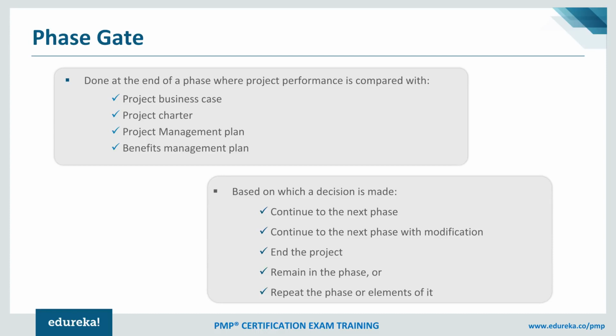When you proceed working on the project, we look back and check, as a part of the project performance, whether we completed the requirement phase or not. And when we completed the requirement phase, whether my requirement specification document has been created, and whether it has been approved by the stakeholder or not. And based on the overall progress, we then make certain decisions, like for example, whether to continue to the next phase.